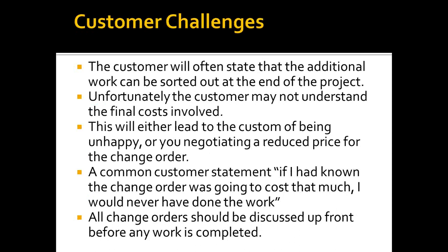There certainly are some customer challenges as you go through dealing with the clients and change orders. A lot of clients will say, you know what, just don't worry about the change orders, just do the work, we'll handle all the money at the end of the project. Unfortunately, as the customer goes through this, they may not realize just how much some of these change orders are, and at the end of the process, either the customer is going to be unhappy or you're going to be negotiating the price and probably reducing the price of their change order.